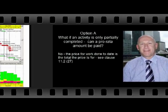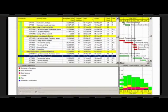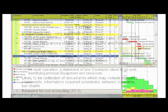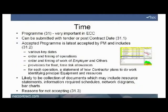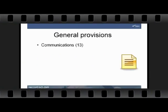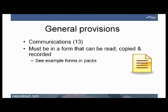Four reasons are stated in Clause 31.3 for the project manager to not accept the programme. The programme must be in a form that can be read, copied and recorded.